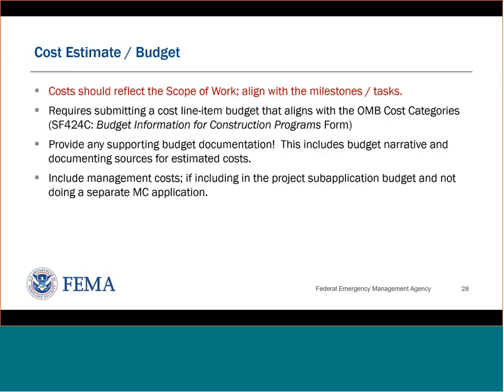So we also ask you to include management costs in your budget. That's especially true if you're including management costs in the project sub-application budget and not doing a separate management cost application. And in your sub-application, your management costs can be up to 5% of the cost of the project. Next slide, please.